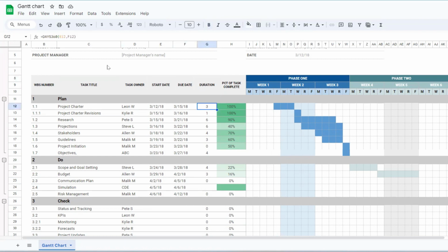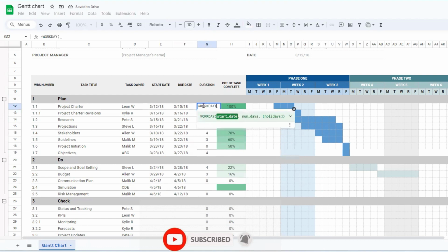For duration, there are two formulas. One, you can use DAYS360, end date minus start date, that you can use, or you can use the other formula as well. For example, simply if you do this minus this, it also will hopefully give the same value, right? It has given the same value. The best thing is to use the DAYS360 formula.